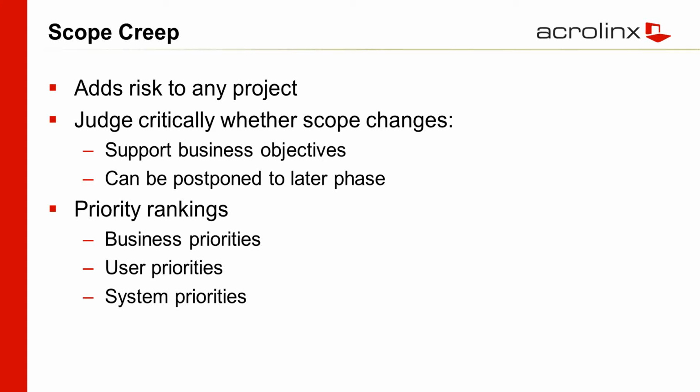And that's when it comes to IT preference for things like we've standardized on such and such a content management system. Well, if that's not critical to meeting business objectives or making users happy, then that gets moved to the third priority. And he pointed out that often, by the time you get to the third priority, those things are just never addressed. And if they're not critical to the business objectives, they're not critical.